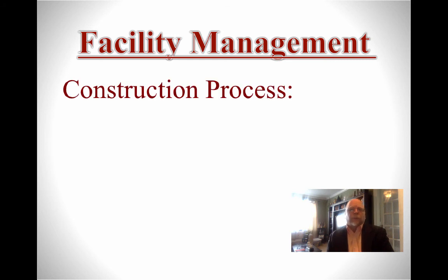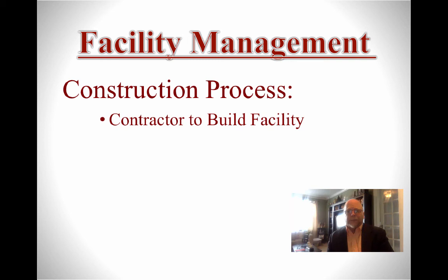The construction process: you need a contractor to build your facility. You're not going to build it yourself. If you're building a sports facility, you have a team. You build a team. You don't build a facility. You're going to want to get 4 bids at the least from various contractors.